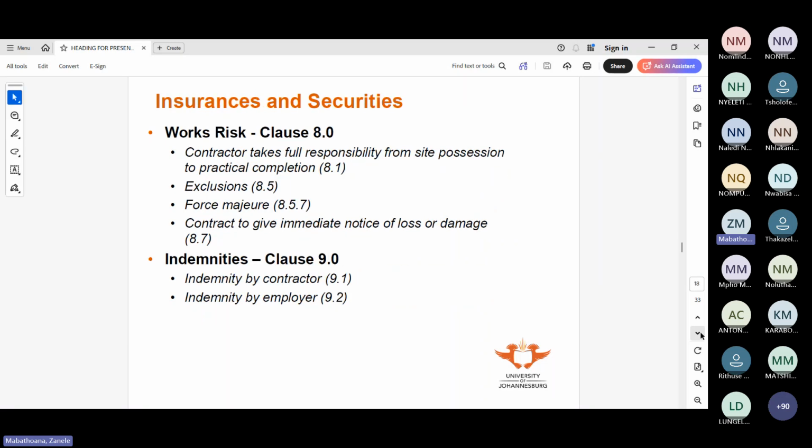So the contractor will just design his temporary works, those temporary hoardings, where the gate is going to be the access gate for his people, where the side office is going to sit and the toilets, and those temporary works would be his designs. But anything else, in terms of JBCC, the employer is responsible for design.